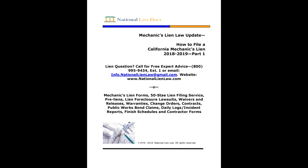However, by definition, there is no lien for such persons or entities as building permit expediters, soil preparation work for landscaping services, such as disking or rototilling, companies that sell as opposed to rent equipment to a contractor, supplying tires on rented equipment, selling materials or equipment as opposed to rental, temporary fencing, portable sanitation, lunch wagons, construction payroll services, construction software providers, real estate brokers, and others who do not provide any services or materials consumed in the construction.